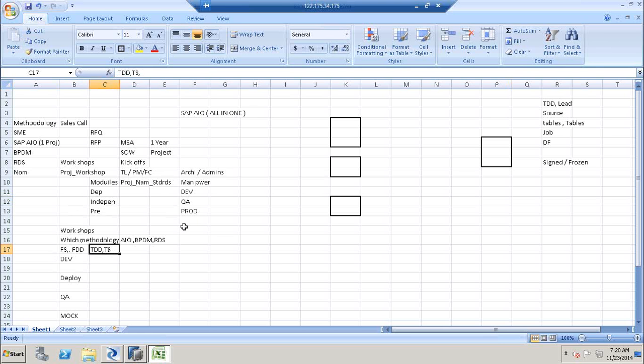That is the understanding that this particular requirement is frozen. If the business owners, the data owners, or the functional customers on the customer side identify new changes, we will not say we will not do that, but they will be identified as change requests, and additional revenue will be required for that.